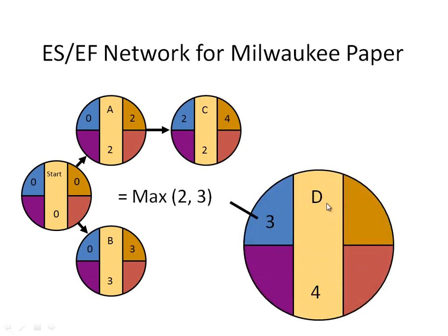For activity D, we have 2 predecessors, A and B. For D to start, we need to finish both A and B. But A will be done in 2 weeks. Unfortunately, I will not be able to start D after 2 because I'm still waiting for results or output from B that I can use in activity D. So I have to wait for B to be done.